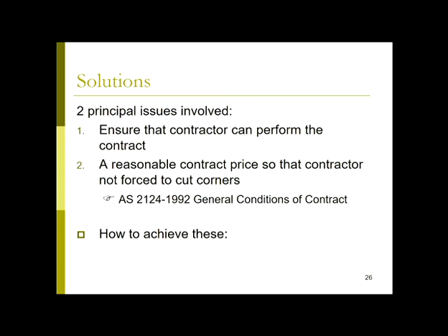And the solutions come back to you largely as the project manager in doing things like ensuring that the contractor can perform the contract. So it may be checking that they have the skills and the technology to do what it is you want done. And also that you provide within the contract a reasonable payment schedule and contract price so that the contractor can remain viable and, just as importantly, is not forced to cut corners, look for ways of skimping on quality, for example, in order to complete the project.